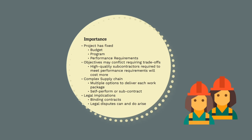On top of this, construction projects have complex supply chains. There are always multiple different options to deliver each package of works — we can do everything from self-performing the works using our own labour, plant and materials to using full turnkey subcontractors. There are multiple risks and scope allocation decisions that need to be made for each package of works. Something as simple as deciding to free-issue concrete to our formwork contractor could have significant or unforeseen logistical consequences.